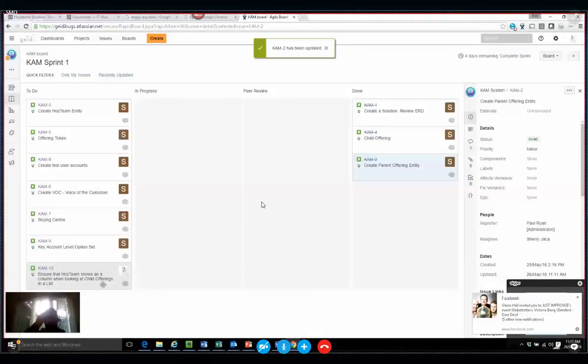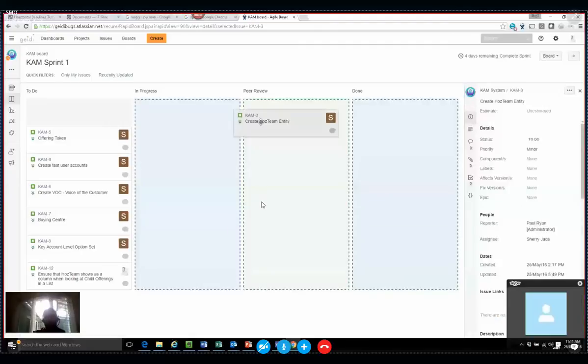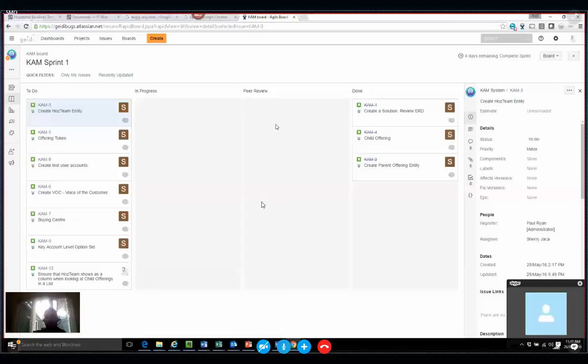If you want, you can split them up, assign some to Joy, some to Sherry. And then what I want is, if Sherry does this one, then she should put it in progress, then put it into peer review, and then assign it to Joy. And Joy should look at how it's been done and go, oh, yeah, I understand it. Only once the second person understands it does the second person move it into done. So if there's a problem, then we can all talk about what's happened.